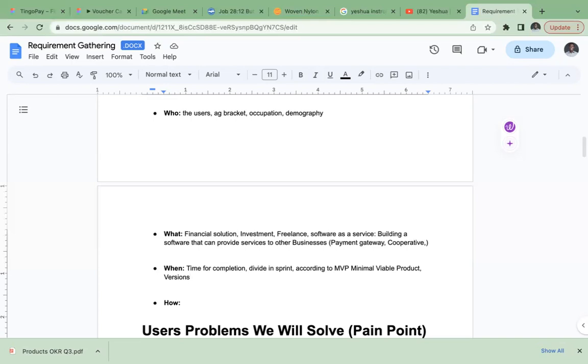You know, before you can send money and receive money, you should log in, you should register, and the whole process, all those are involved. But we call it MVP: send and receive money. Then in MVP 2, we are saying that we should be able to do utilities, recharge card, TV, and so on. Then MVP 3, we want to add loan to it.